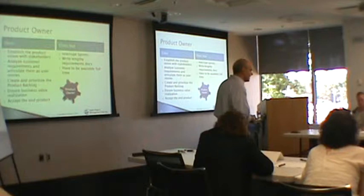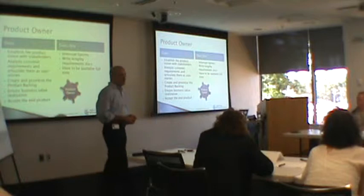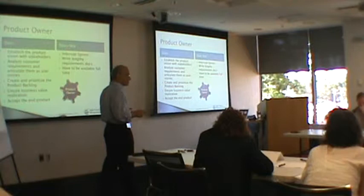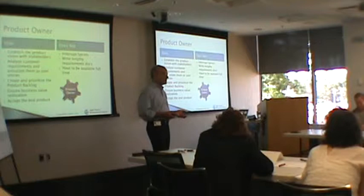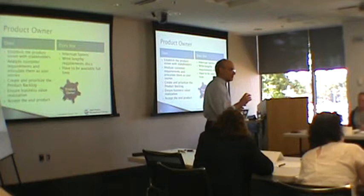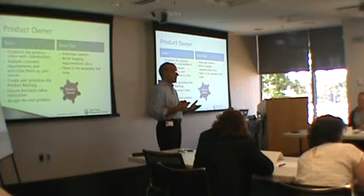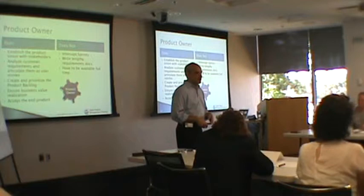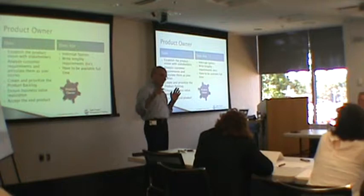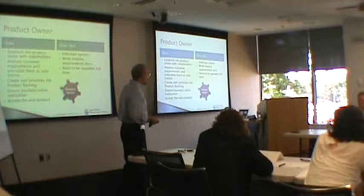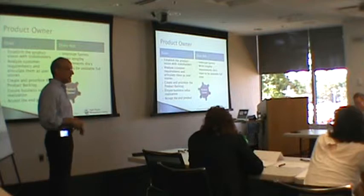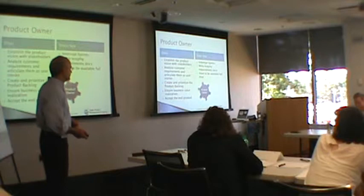The Product Owner should not interrupt sprints. What would be an example of interrupting? Sprints should never be started or stopped unless a particular thing happens. The only reason to interrupt a sprint is if the goal can no longer be realized — either the customer no longer wants it, technology has changed, or some organizational thing has changed. In that case the Product Owner can cancel or terminate the sprint. In traditional waterfall we have all sorts of things interrupt the work; the intent in Scrum is you don't want to stop development or have any downtime.